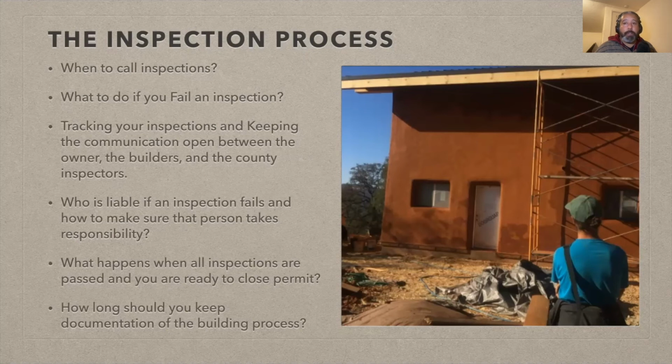So again, that goes back to have your plans be reviewed by your builder before you submit to the county, because I can't tell you how many times I've seen architects put stuff on the plans that don't need to get done. The engineer says it's pointless. This is like double-sided shear walls. Like why? Single shear walls are fine. So just have your builder look at it before you submit it. It'll save you lots of time and it'll save you lots of money.